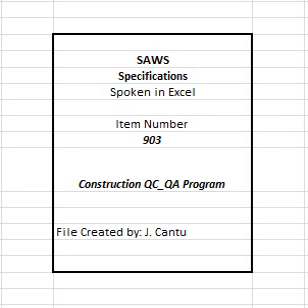5. Construction phase. A. Initial phase. The initial control of each separate feature or segment of work is made at the outset of the operation to assure a proper start-up of work and full compliance with all contract requirements. This is the phase in which the contractor will establish acceptable standards of workmanship. The initial phase is the most logical time to resolve any difference of opinion or interpretation of plans, rather than when the work is in place.